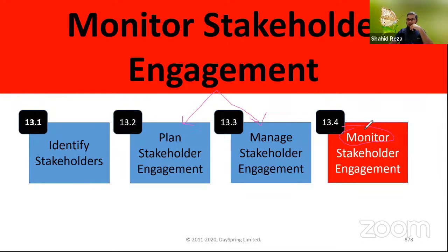So you need to monitor, control, ensure. If you see we have planned 10 items, but we have just implemented 7 items. 3 items we have not implemented. So monitoring will tell you that there are gaps in the execution, 3 action plan items that we did not actually execute. So that gap you can identify. What is the gap between the plan and execution?